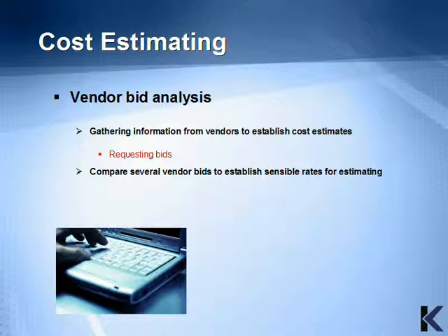Vendor bid analysis involves gathering information from vendors to establish cost estimates. This is done when performing a request for bids. It compares several vendor bids to establish sensible rates for estimating.